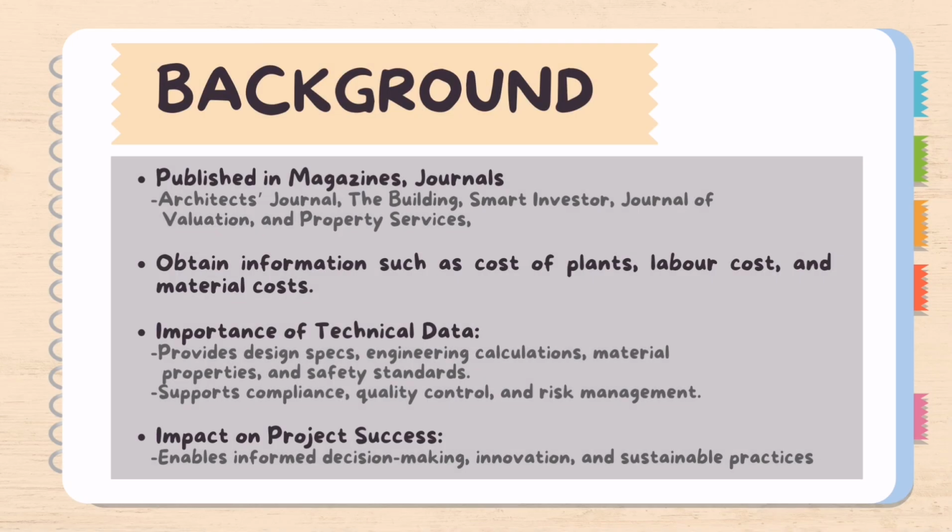This is cost data required by the quantity surveyor that is published in journals, magazines, and other material related to design, building, management, and the construction industry, and the built environment. In these data, the quantity surveyor can obtain information such as cost of plants, labor cost, and material costs. Besides, the importance of the technical data is it can provide design specs, engineering calculations, material properties, and safety standards.